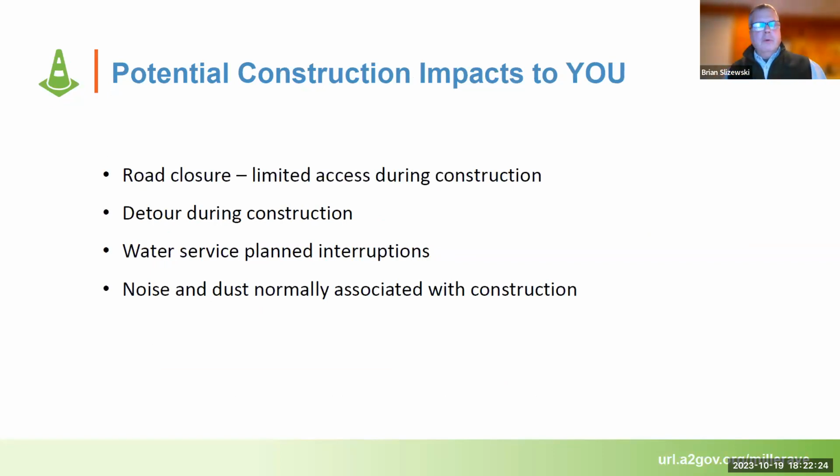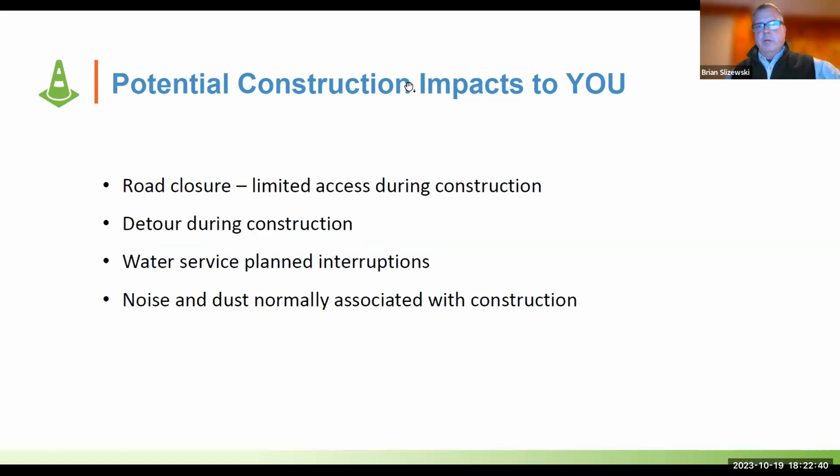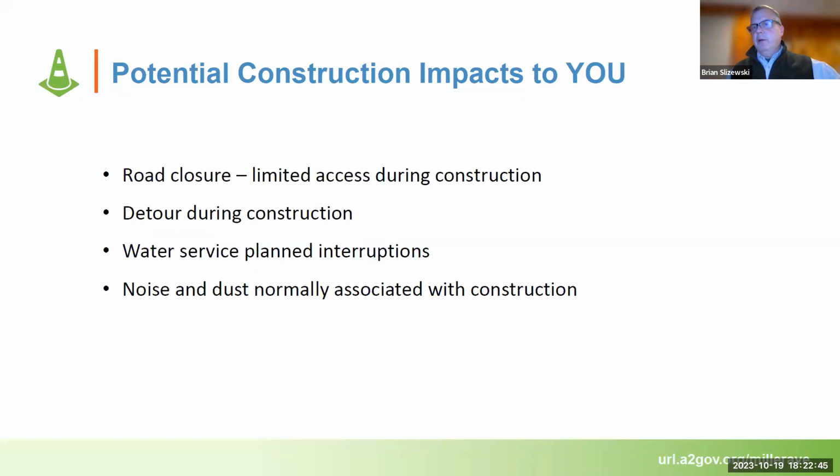For those residents who live in that immediate area where the water main is being replaced, there are some planned water interruptions that are absolutely unavoidable. We have to switch over from the old water main system that you are connected to over to the new water main. So there are some planned interruptions, and you are notified. We have door hangers that are put out ahead of time, so you are notified that there is going to be a planned interruption to your water.